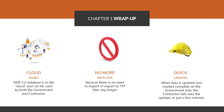The most important difference with RMS 3.0 is the potential to significantly reduce your paperwork on a project. RMS 3.0 allows you to electronically sign documents and upload them electronically, including submittals — potentially eliminating hard copy submittal requirements such as an original, plus multiple copies, and a CD. Wet signature transmittals can take a huge weight off the QC manager in terms of resources and time. Depending on the district, you may still be required to do extra paperwork, but this does not happen very often.